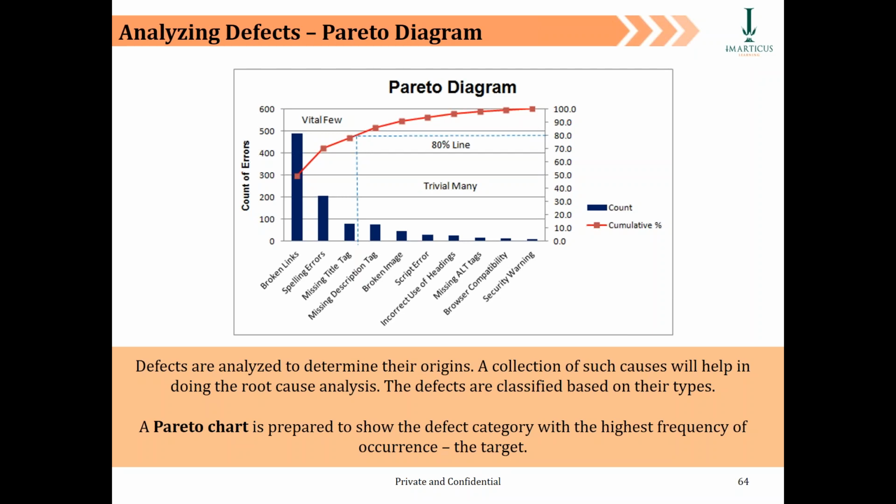So remember, your job as a Scrum Master is to ensure that you have logged the defect, you've given it a category and status, and then you're tracking it for closure. So there's a date and timestamp when the defect was raised. There's a date and timestamp when the defect was closed. So all that info must be entered into the tool.